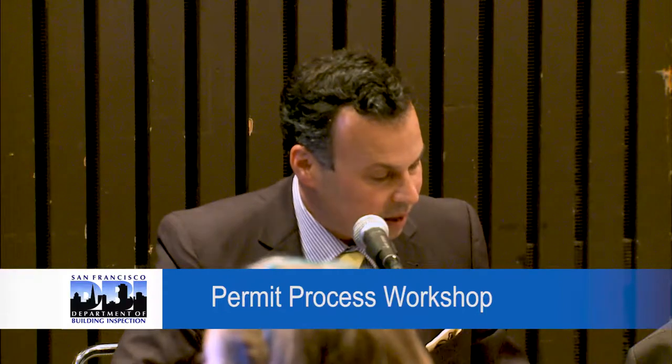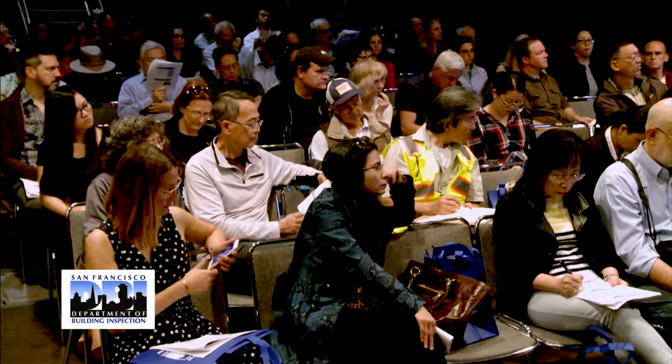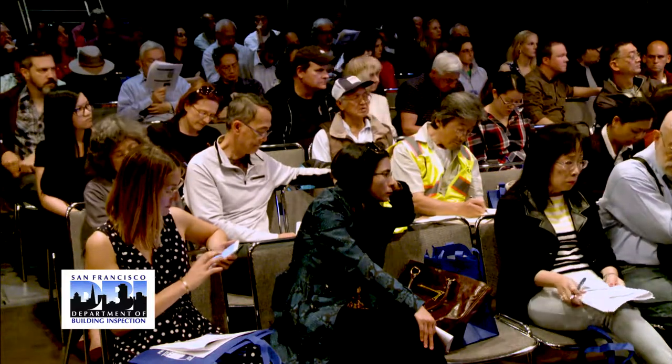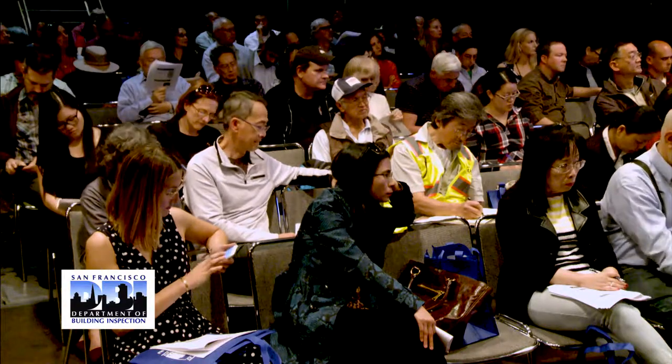So a notice of violation. Notices of violation are generally for people who get caught working without a permit, or they go over the scope of work, generally complaint-based. There'll be a corrective action on the notice of violation, and it'll state with plans or without plans. All right, so we've gone over what you can get over-the-counter permits for.